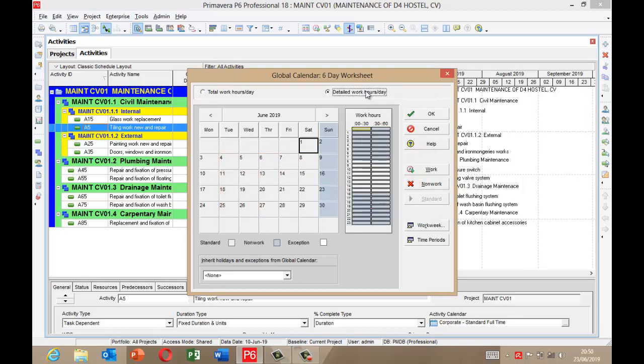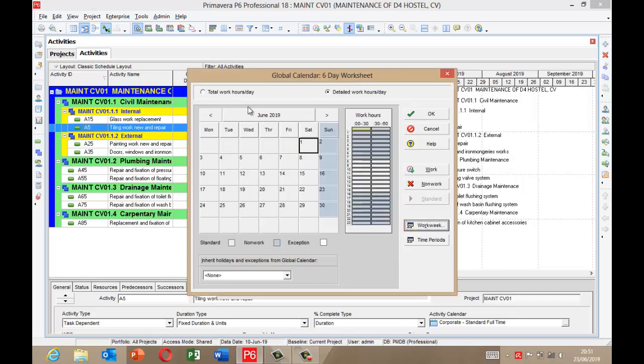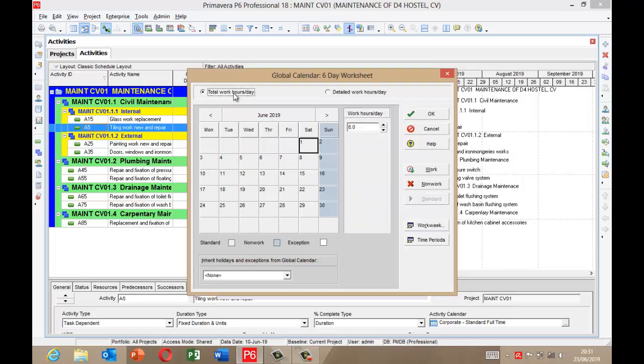Now if you come to detail work hours per day, click the work week again. Then I'm going to select Monday, Wednesday, Thursday, Friday, Saturday. They are all work hours, just to cross check, and come back here. Okay, so I'm working Monday to Saturday.